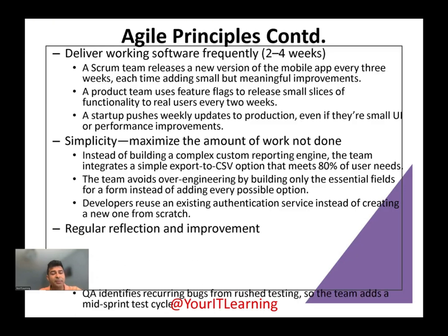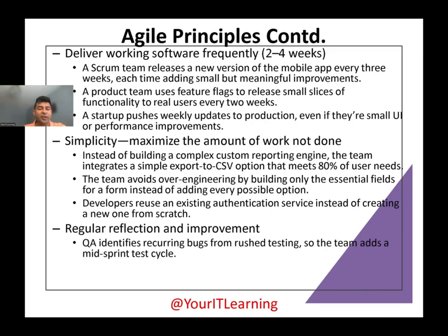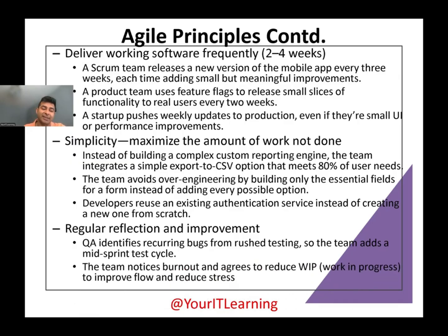Regular reflection and improvement. QA identifies recurring bugs from rushed testing, so the team adds a mid-sprint test cycle. The team noticed burnout and agrees to reduce work in progress to improve flow and reduce stress.